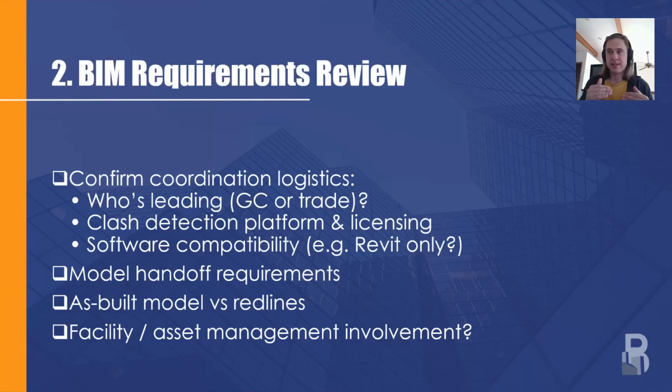At the end of the project, there is another place that varies widely from general contractor to general contractor, and that is the as-built process, which pairs with facility management. When you're handing this model over to the client at the end of the project, what is it being used for? There are some owners that use these models for facility management, and they build asset data into it in order to manage their facilities.